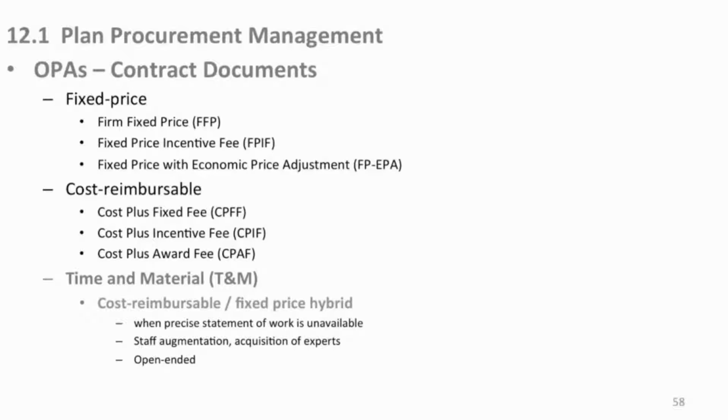They're at your discretion. You say, I need it. They come in, you release them, they're gone, and whatever it costs, time and material, you pay them. You'll have payment schedules on how much the hourly rates are and so on, but you won't know what it is until you actually get somebody in. Oh, they're at this hourly rate. So that's time and material.